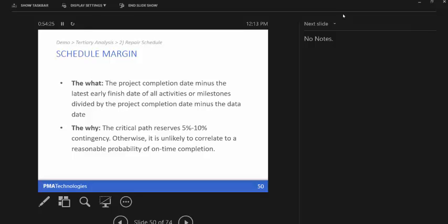But now we have no critical activities in our network because we defined criticality as 0 days float. All our activities are going to have 50 days of float or more. So, as you see, Sergio's already defined our criticality here to 57 days. And we can increase our near criticality now too with that same idea. We can increase it up to about 10%. And click Save.